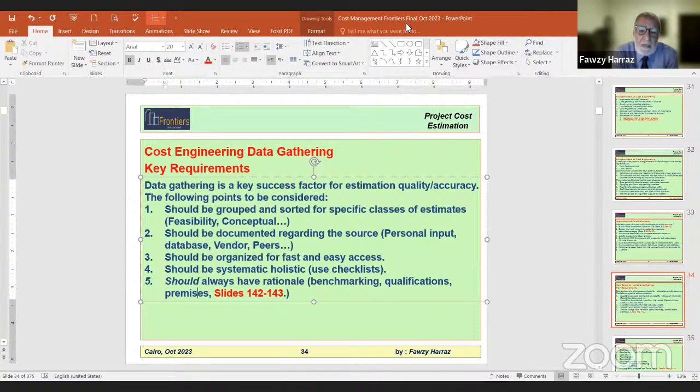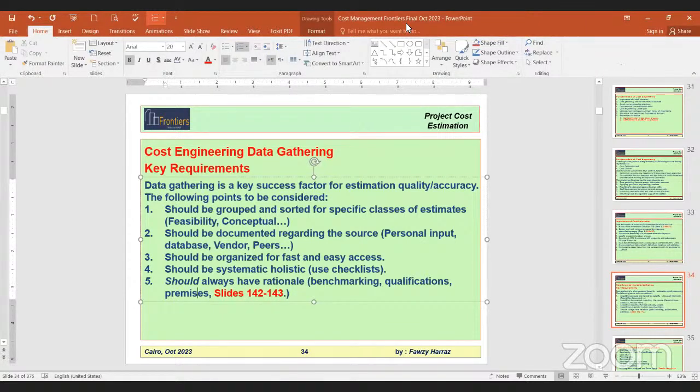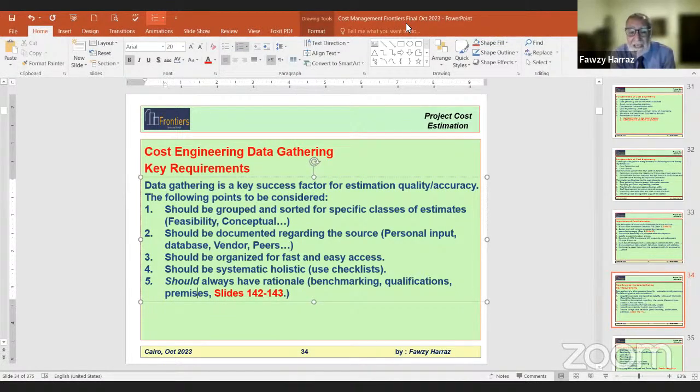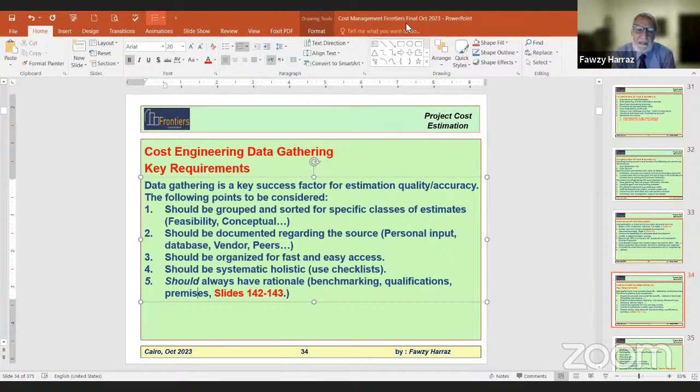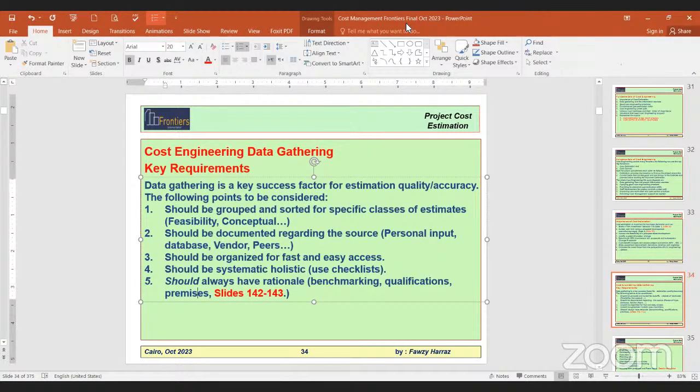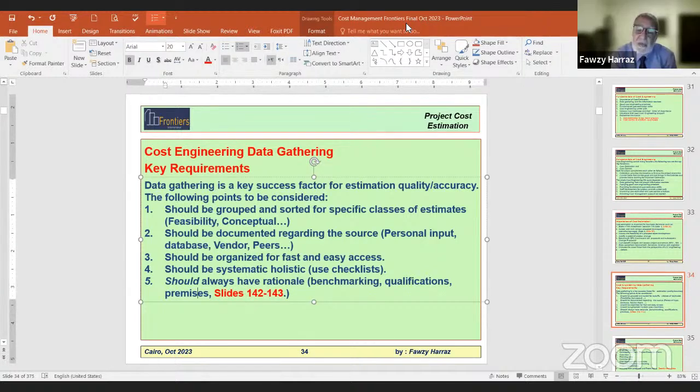When you see that your estimate is 1 billion, and the market prices came as 1,500, 1,600, and 1,700, it's quite clear like the sun that there is a collusion and there is bid cartelling. And most of the time, this estimate and budget are in some way revealed to the public market, and the bidders know it. So this is also part of the problem. No, I think these estimates are internal. They should be internal. This is classified information that the economics and financial analysts know. It should be, of course, because information always leaks.